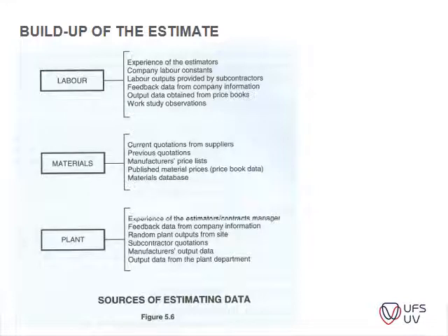So building up of your estimate, also a very important slide to know is your labor. So you've got the sources of estimating data. Your accuracy of your rate buildups is influenced by the experience of your estimator, labor constraints. How much labor do you have? Do you have to outsource other labor to assist you to actually get the numbers on site? Labor outputs provided by the subcontractors, will they be able to actually do the work within the allotted time?